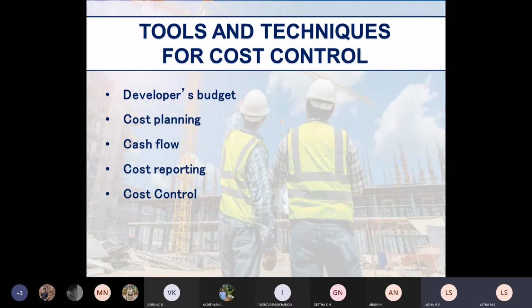Cost reporting is the toughest job among all in a complete project, because you have to report to the developers who are constructing the building. You have to report to them what the material cost is today, what the mason cost is today. You have to produce all that as a weekly report, and present what you would have planned in a PPT, or analyzed using software, in front of the structural engineer or any engineer available with you in the construction.